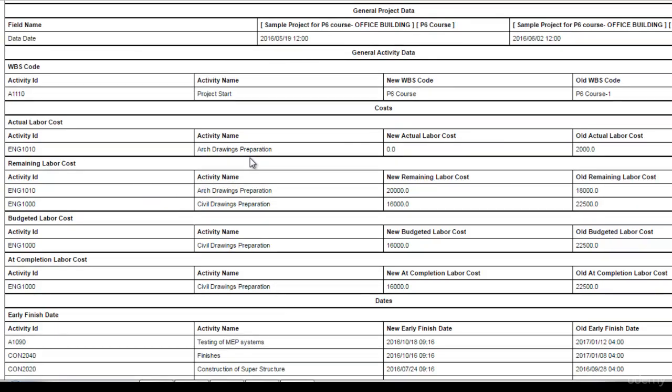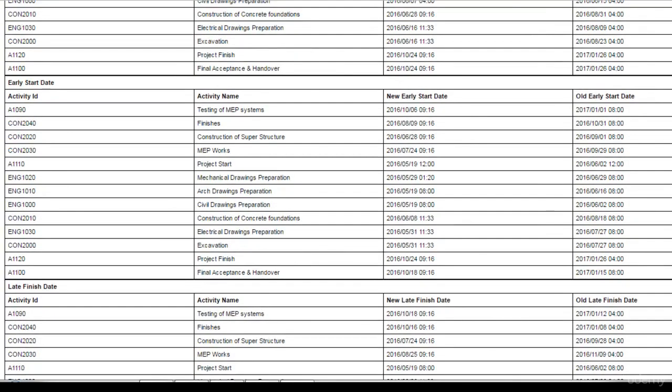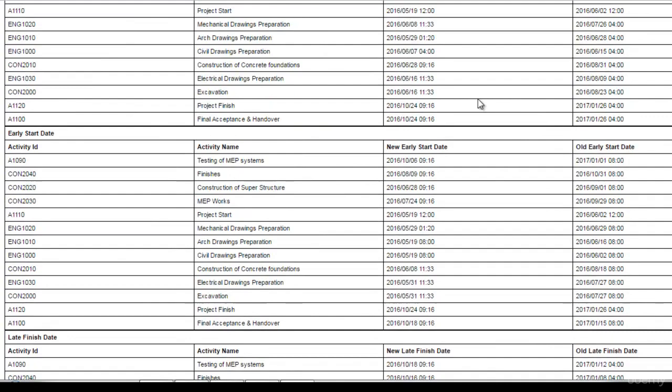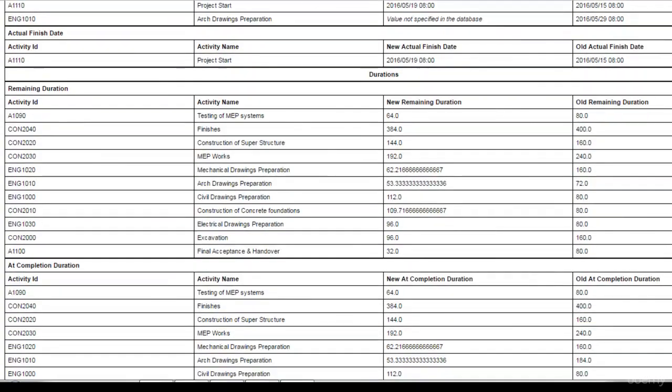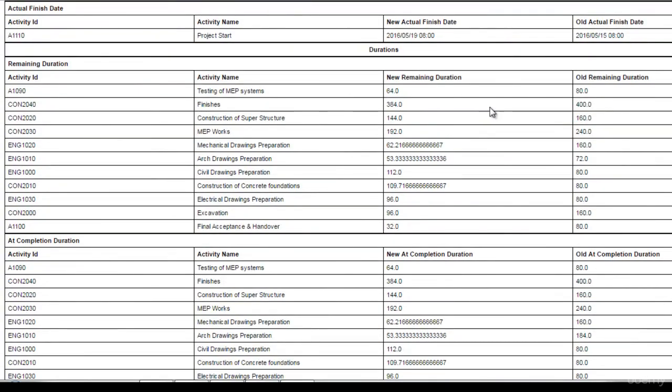The new labor cost is zero. However, the old labor cost was 2000. Similarly, I can see if the activity early start has changed or not. I can see the activity late start. I can see the activity remaining duration in the two projects.